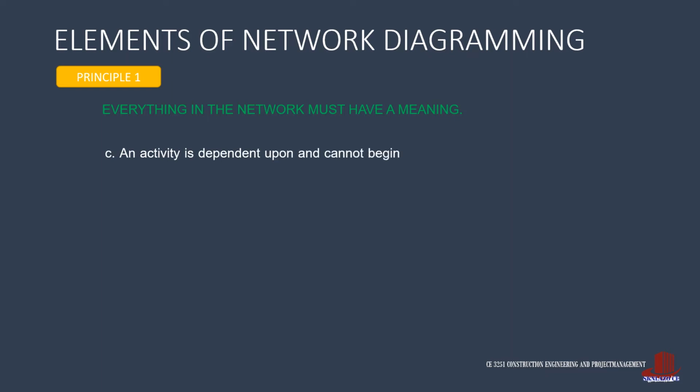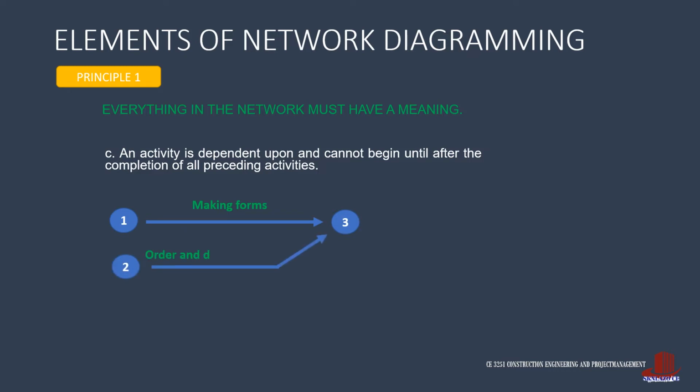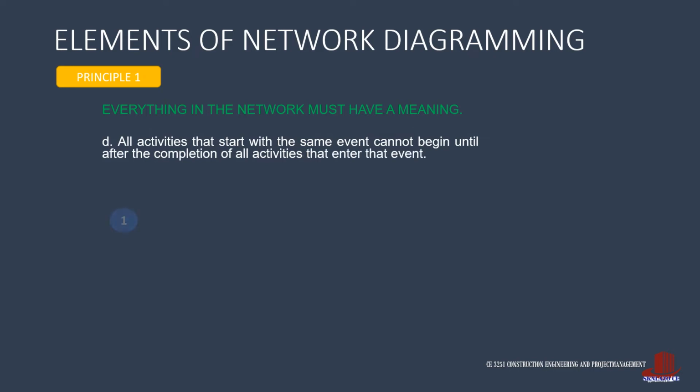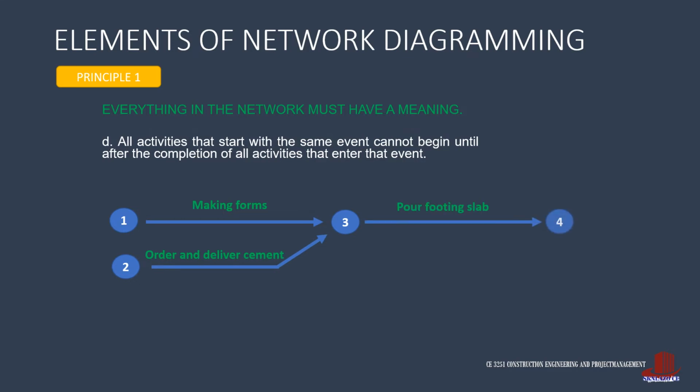Next, each configuration of the arrows also has meaning, and an activity can only start after the completion of all the preceding activities. Multiple succeeding activities are normal, and they can occur as long as those preceding them are completed. Such activities intersect paths at a single node.